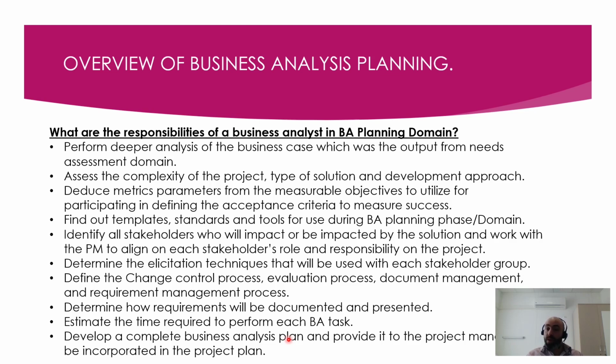It's not the project schedule, it's a schedule that mainly sequences the business analyst activities, and that should be submitted to the project manager to incorporate that business analysis schedule, based on the estimation of the business analyst, into his project management plan, because again that will have impact on his project constraints and the schedule of his project, which is part of his schedule management plan.